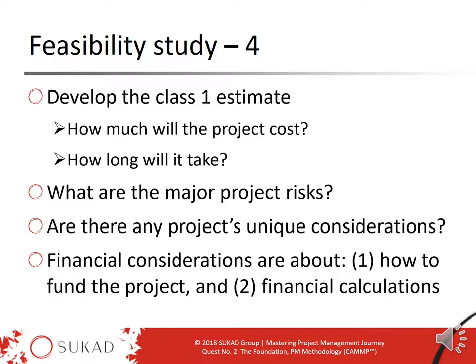Finally, the financial consideration. Usually we look at two things: first, how are you going to fund the project — equity, crowdfunding, bank loans, internal budget, or a partner? Where will the necessary funds come from? Second, if the project is expected to generate a financial return, you need to do financial calculations such as break-even point and return on investment to determine if the project is profitable.